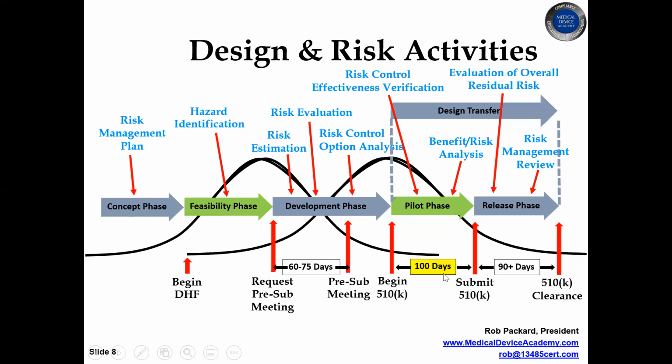So that's why I'd say 100 days here. That's also when I write the 510K. I write it in parallel with the testing. And then once you submit your 510K, you're waiting 90 plus days for the 510K clearance. And then you can have your final design review and release your product.